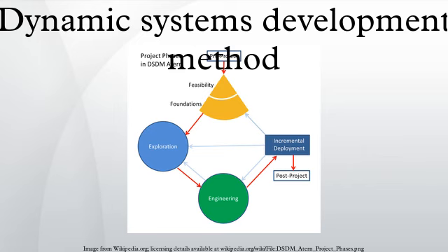DSDM is an iterative and incremental approach that embraces principles of agile development, including continuous user-customer involvement. DSDM fixes cost, quality and time at the outset and uses the MoSCoW prioritization of scope into musts, shoulds, coulds and won't-haves to adjust the project deliverable to meet the stated time constraint.